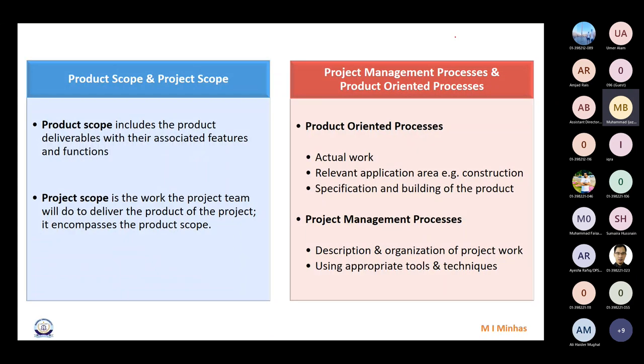Another way of doing it is, I plan that while I am constructing the gray structure of the second, third, fourth floor, I will start the finishing work at the ground and the basement level. Is it clear? Yes. And once this is done, then I'll move on to the rest of the 4 floors. I actually want to rent out these things earlier. This is my purpose. But I have prepared the complete plan and estimates and everything right in the beginning. So in this case, my project is initiated once, planned once, and executed once, but the execution steps are different. This is what your case was, I guess.